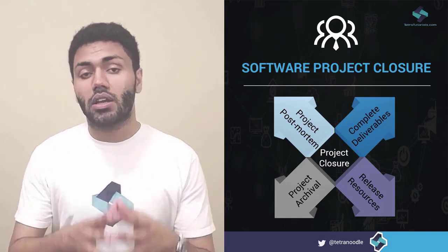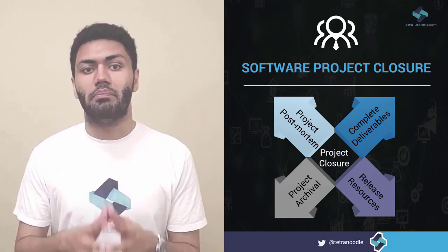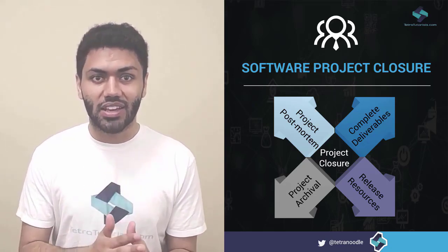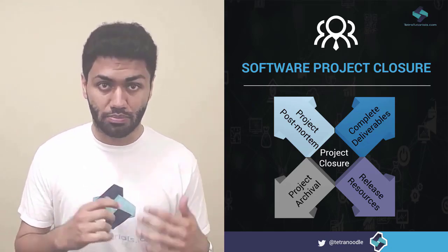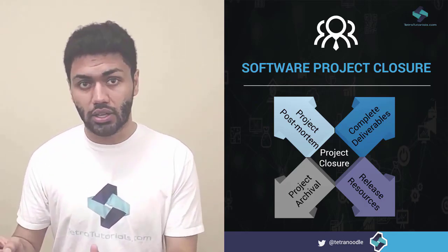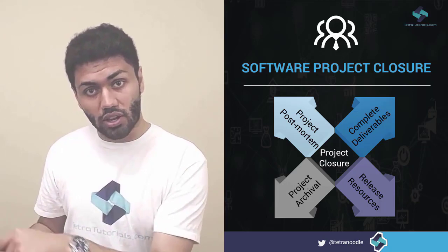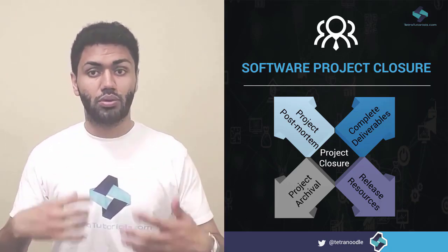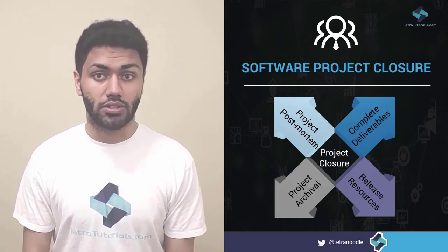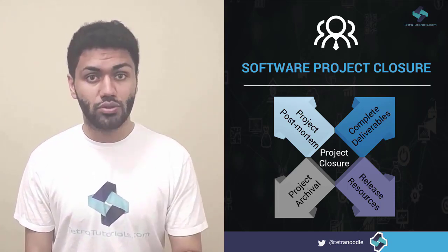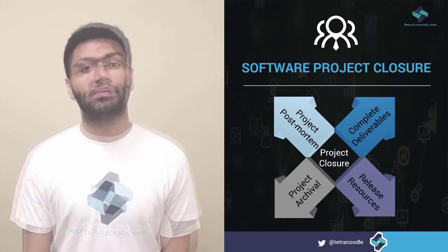But care must be taken to make sure whether the reuse is legally valid. In some instances, the artifacts which are produced may actually belong to a particular customer or client. And since they are the legal owners of the intellectual property, you may not have the right permissions to reuse them for other clients or projects. So in those kind of cases, the reuse is not permitted.